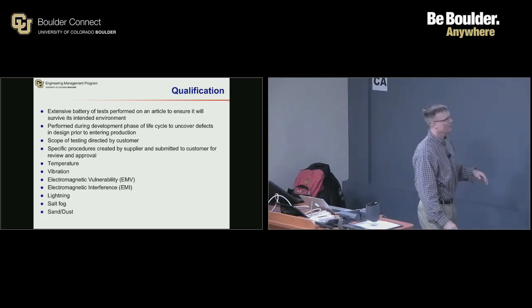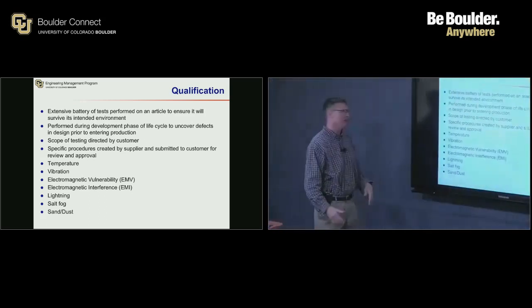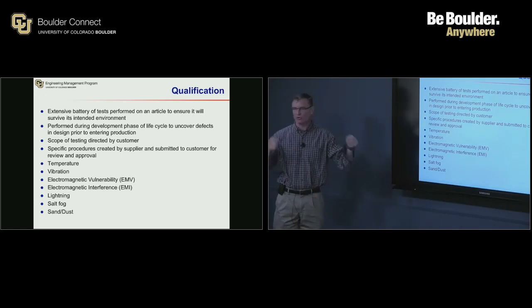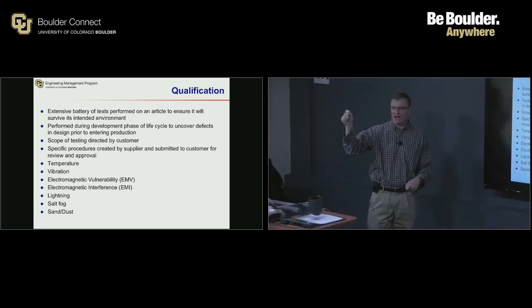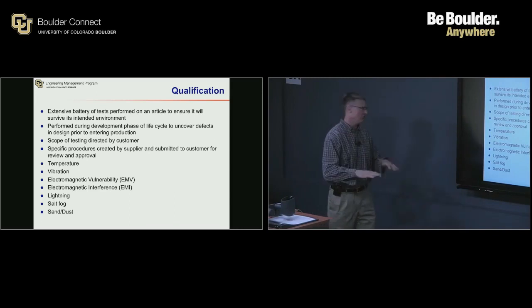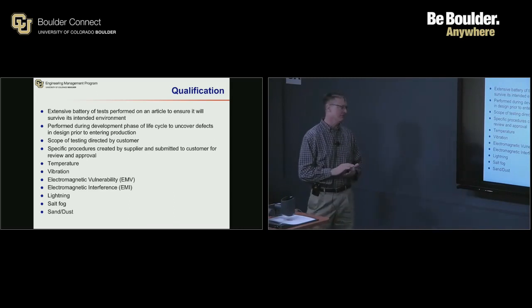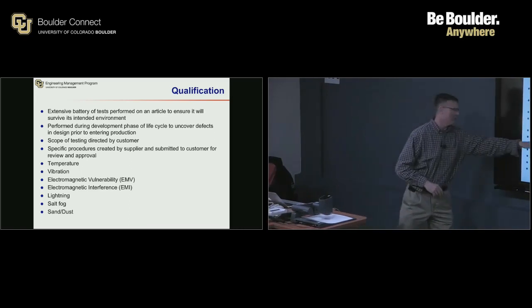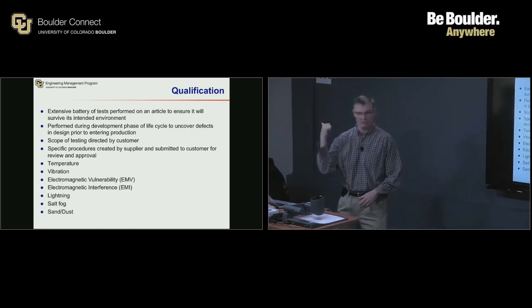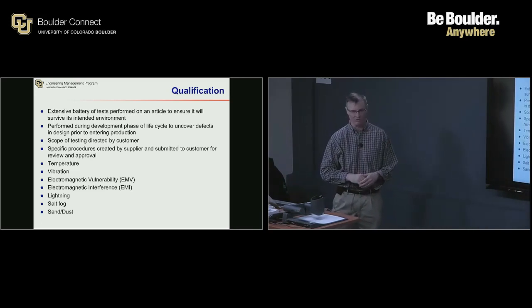All right, qualification testing. Qualification is a huge battery of tests, lengthy, expensive, and it is supposed to hit all the corners of the envelope of the thing. So take it to the hottest it's ever going to see and the coldest it's ever going to see and shake it the hardest it's ever going to be shaken. And it's not just the temperature and vibe, but it could be exposure to electromagnetic radiation, tests for interference. Does it interfere with adjacent electronics? Lightning strikes. There's companies out there that will strike your thing with lightning for you, and see whether it survives that or not.